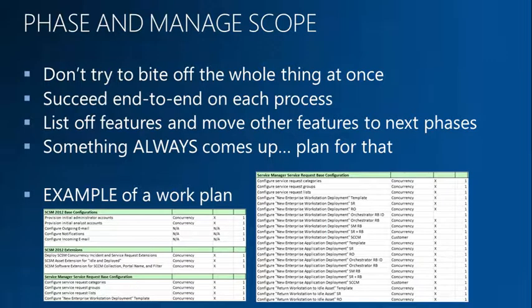Awesome task, and I get excited about that kind of thing because I love doing automation. But you need to make sure you check your can-do attitude sometimes a little bit and move it into a phased approach. So the idea of it is, that's an awesome idea. Thank you so much for bringing it up. Let's document it. Let's do it in the next phase. And the idea is to manage it sort of like a development project. Not a heavy development project, but just in a way where you're documenting the things that we want to accomplish, and document them in a way that allows us to prioritize them and make sure that by the time we go live, we're able to accomplish it in the time frame that we said we were going to succeed in.